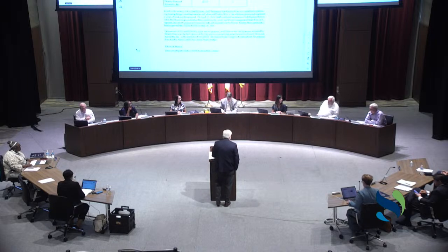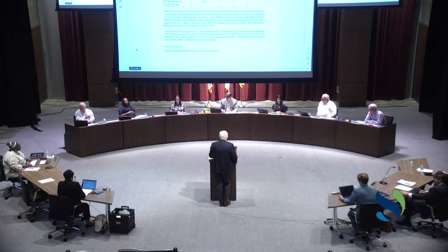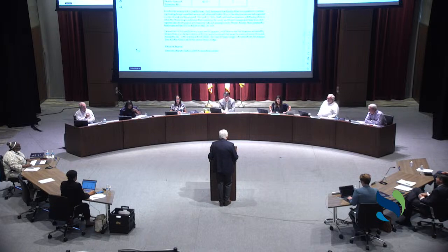Marty, can you put the bid in context to what you indicated you all expected and comparable projects? I just don't feel like I have a really great basis for understanding the $730,000, how that might translate to hours worked. $730,000 at a rough approximation lands at about 20% or so of the overall estimate for the entire delivery of these projects, design being about 20% of the total cost. So with some expected right-of-way cost, utility relocation costs, and of course construction within that.